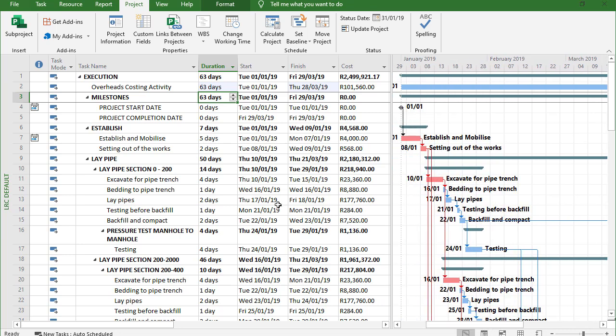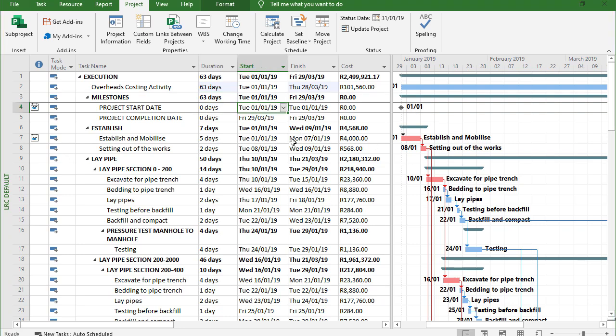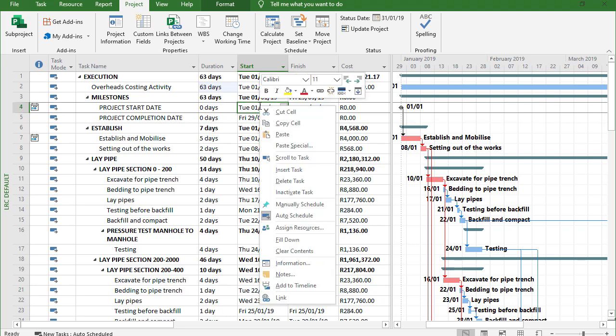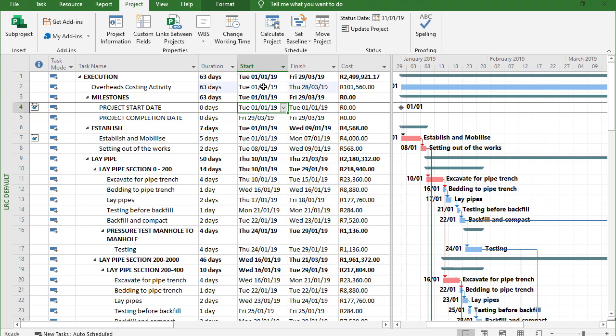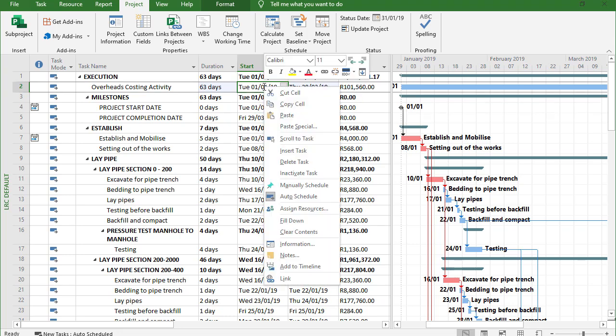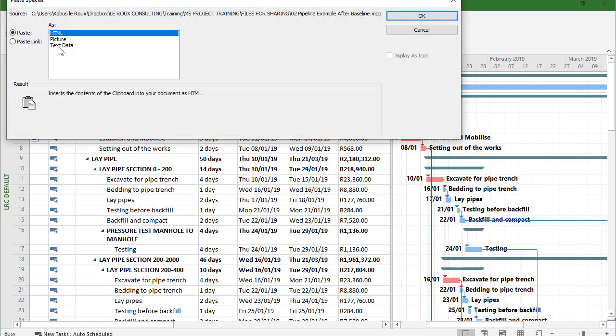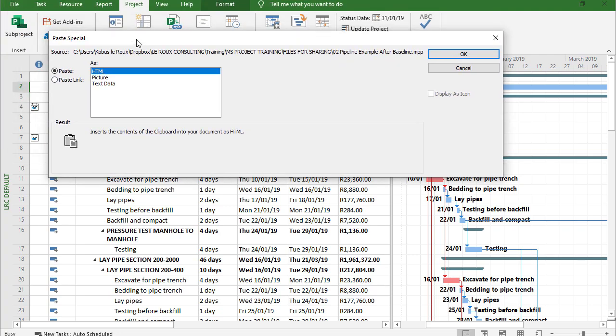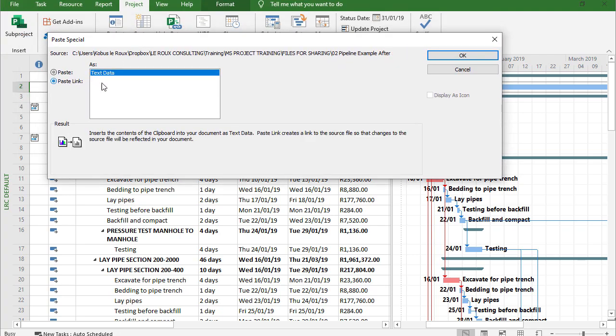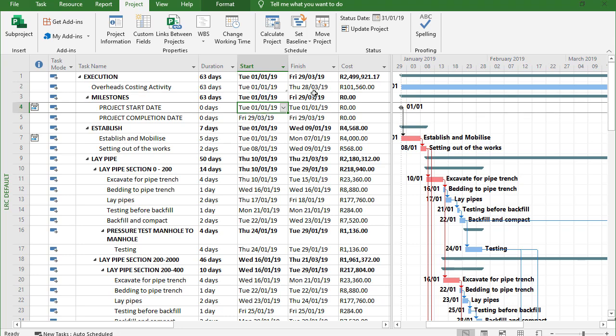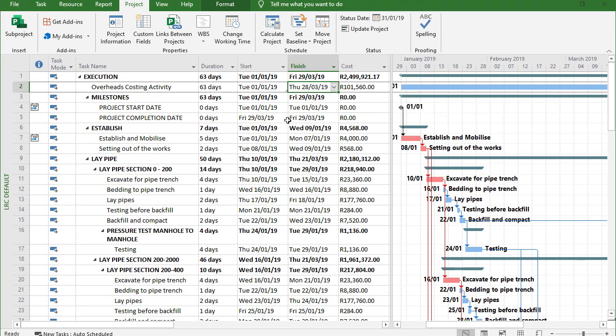Okay, now for the dark art of how do you create a hammock in MS Project. Well it's not that difficult. So what I'll do is I'll take that start date of mine, I'll copy that, and I will right-click in my start date of the costing activity. And now instead of just pasting I will paste it as a link, so you go to paste link text data, click on OK.